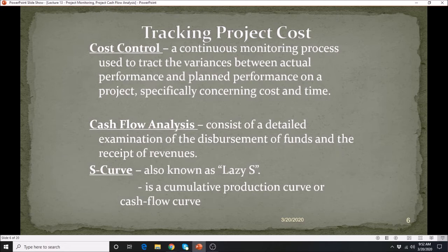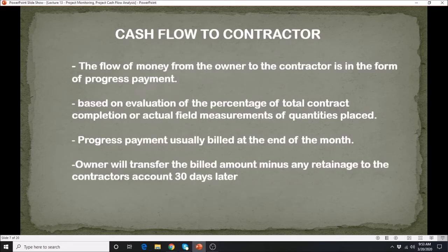So if you are behind the schedule, there are several things that we can do as project managers. As part of the plan, we may need to increase workers, or provide overtime for the workers so that we'll be able to catch up or bring the project back on track. And then of course, probably additional shifting for the workers.